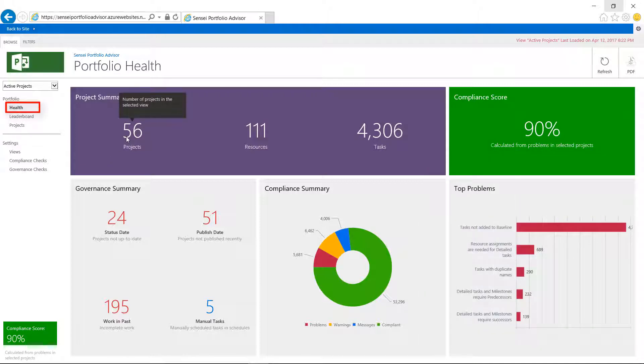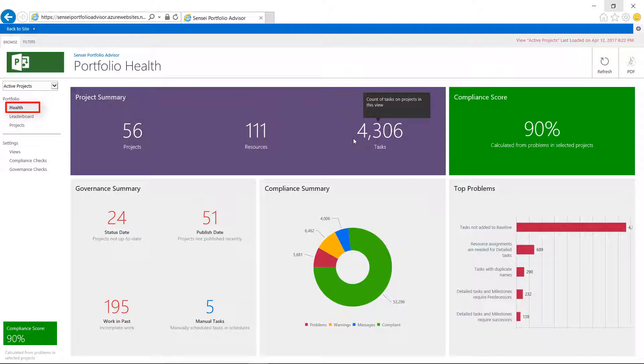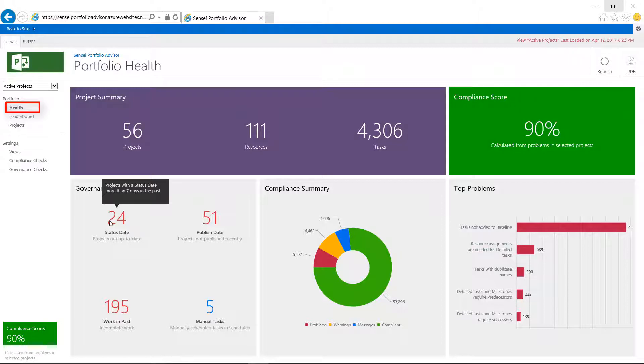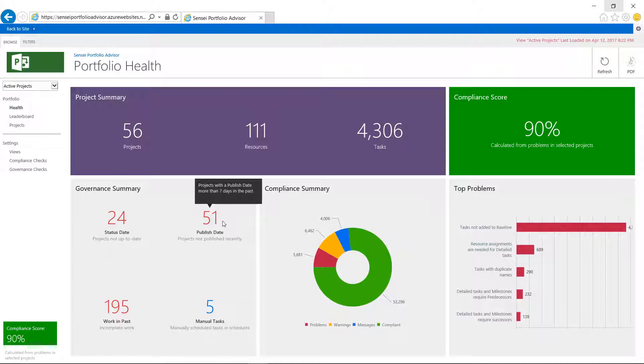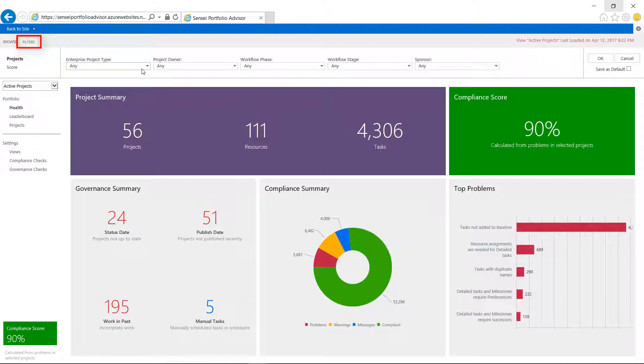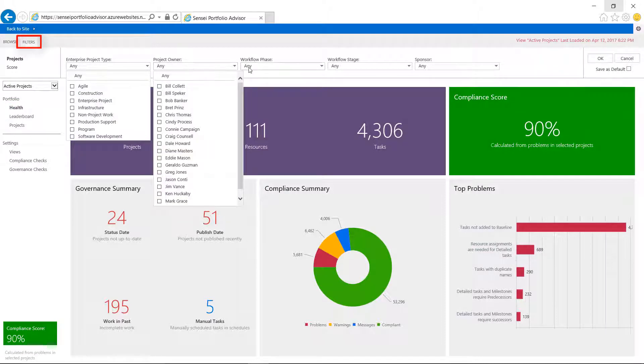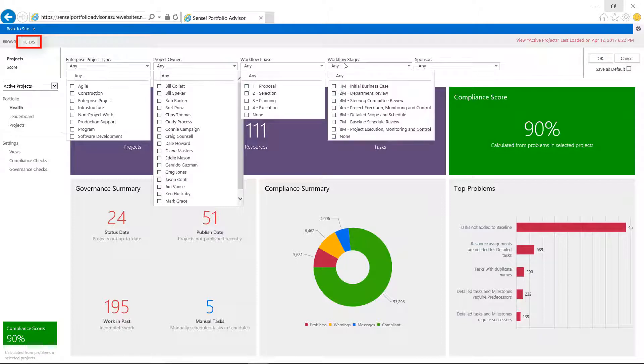On the health page, it provides a high-level summary with count of projects, resources, and tasks in the portfolio, as well as the average schedule compliance score and any exceptions to the governance process, such as projects that haven't been statused or published recently. Users can apply additional filters to quickly get to the projects they care about.